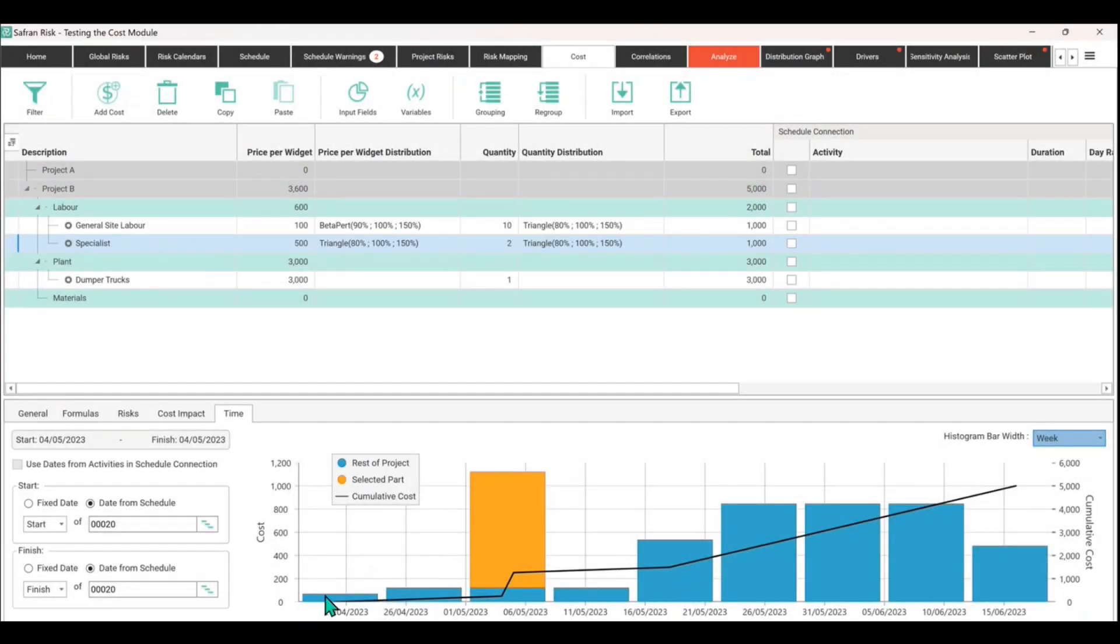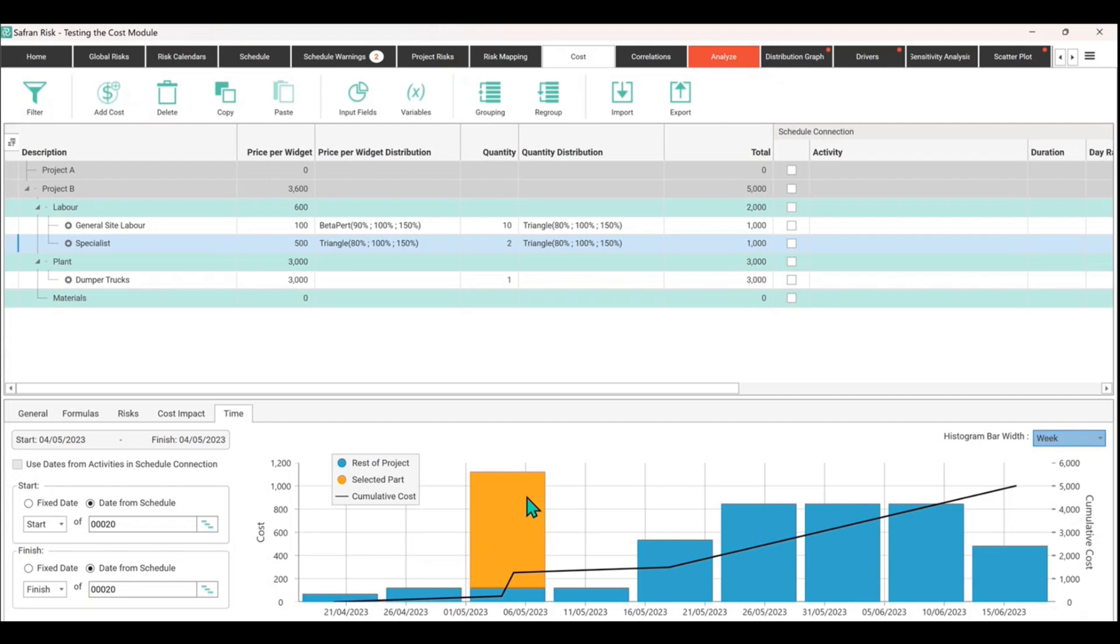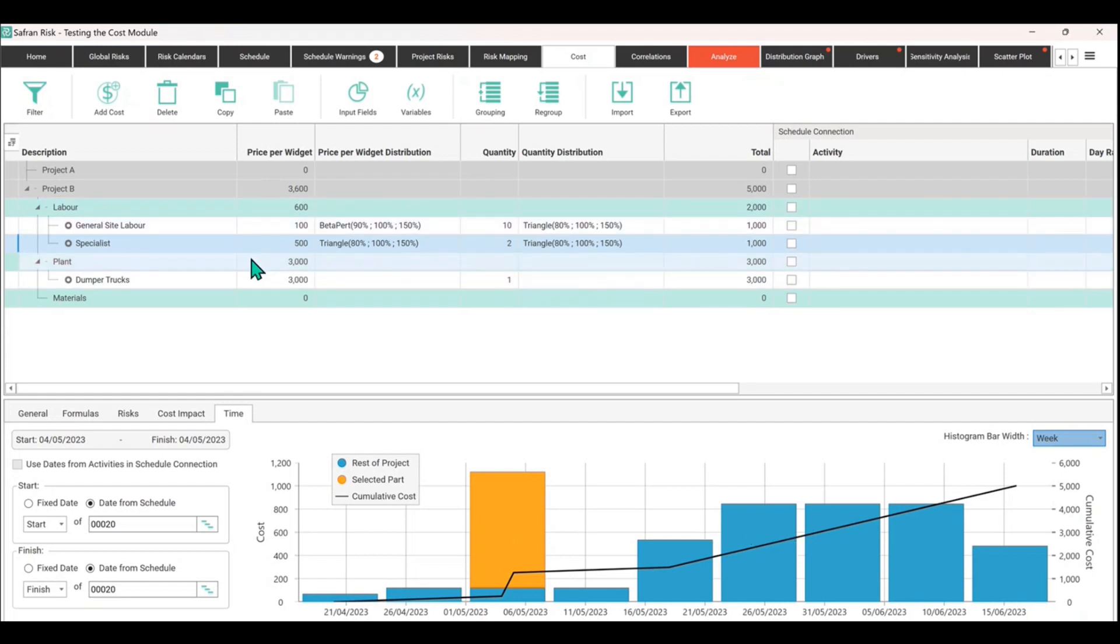So general site labor costs, then we have a spike with specialists who come in and do some investigations or whatever it is they're going to do, looking for historical Roman artifacts or whatever it might be. Then the dumper trucks come in and take the spoil, the muck away, so there's a big chunk of cost there.